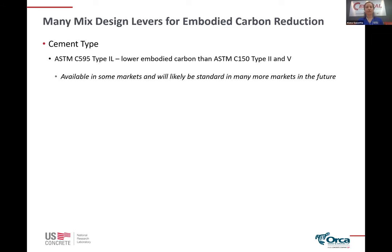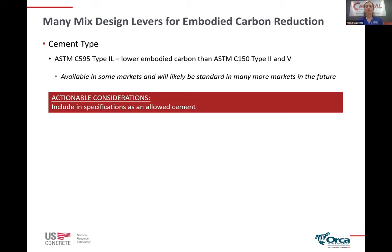The Type IL is a pretty standard cement used in the Pacific Northwest, and in California we're anticipating that in about a year it will be very standard. The holdup right now is that Caltrans needs to approve the use of it — and as a ready mix producer, we don't have unlimited silo capacity, so most producers stick with a cement where they can do both Caltrans and non-Caltrans work. But once Caltrans approves the use of C595 cement — looking like October of this year — it's likely that a lot of producers would be transitioning over, and that would just be standard in the marketplace. The actionable consideration is to have specifications allow both types of cements.